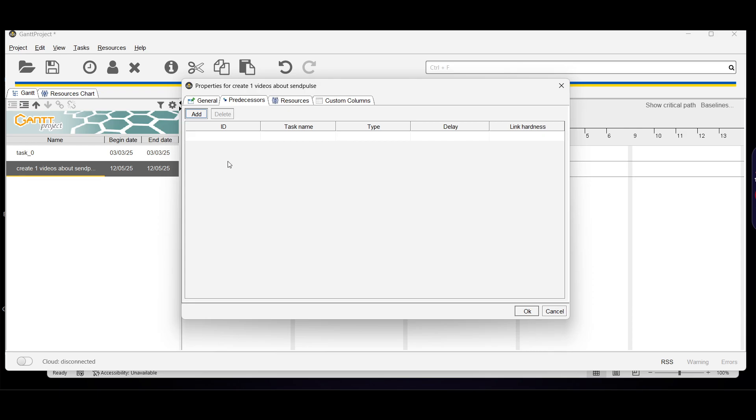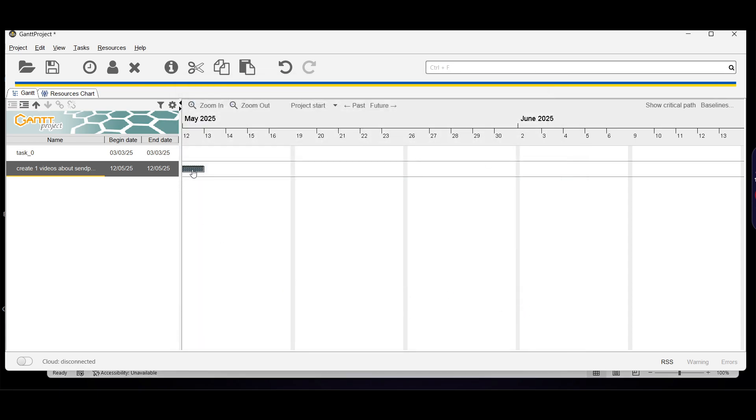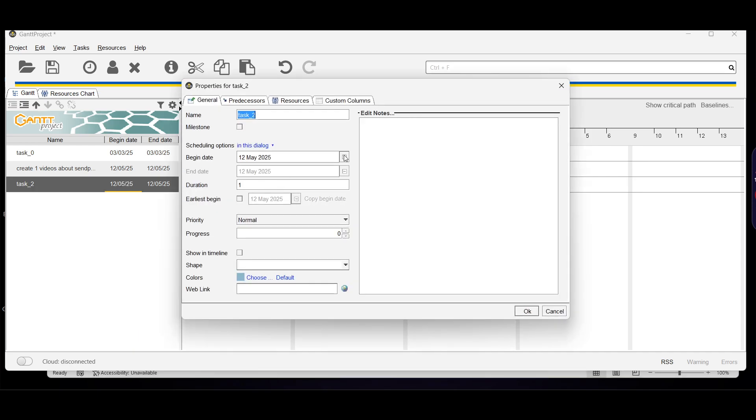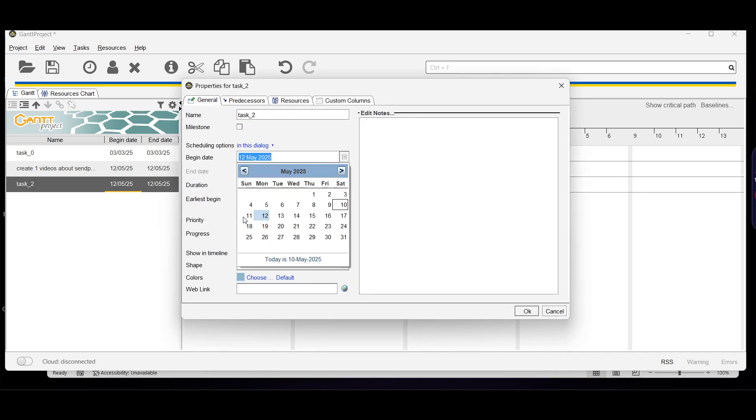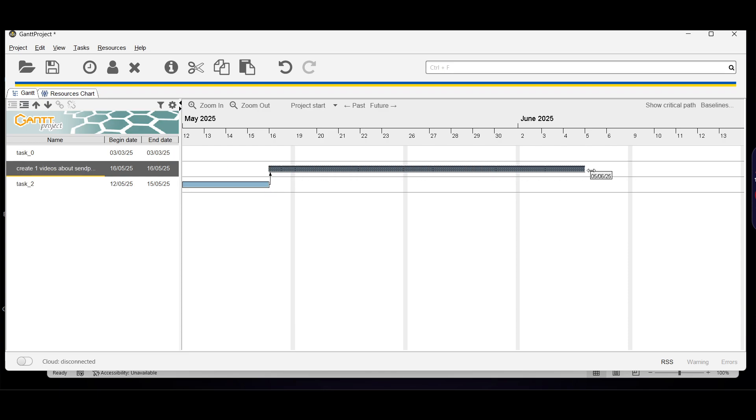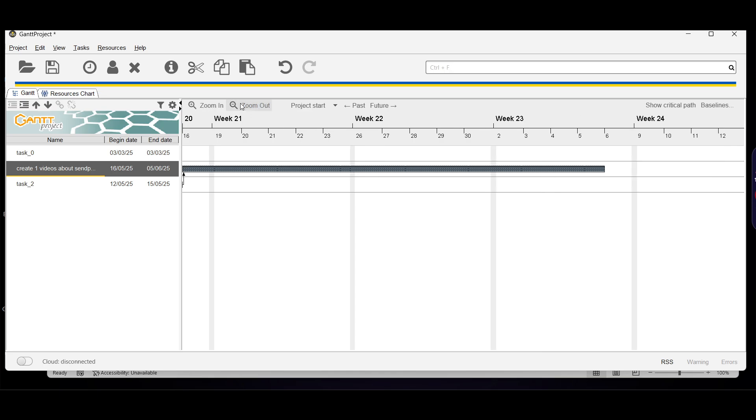To connect it with a different task, go to task and click new task. Let me put a new date here, May 11th, and click okay. It will show exactly on the 11th. You can connect tasks and extend them. If this task extends to June, the time and date automatically changes. You can click zoom in to show week-wise view. Use milestones to mark key deadlines or deliverables in your project timeline.